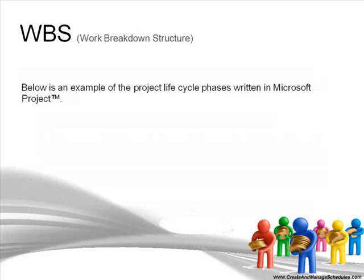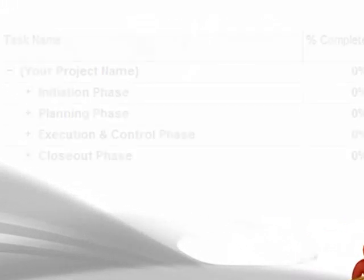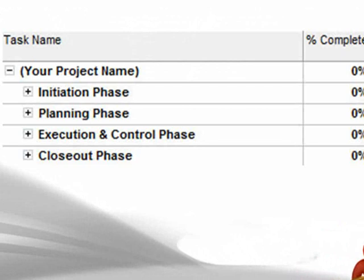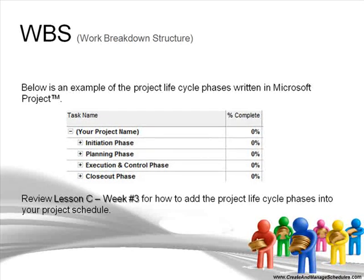Identify the lifecycle phases first because this will allow you to add the proper project management controls. Below is an example of a project lifecycle with phases written in Microsoft Project. Here you see the initiation phase, planning phase, execution and control phase, and closeout phase. If you review lesson C in week 3 of this video coaching tutorial, you'll see how to add the project lifecycle phases into your project schedule.